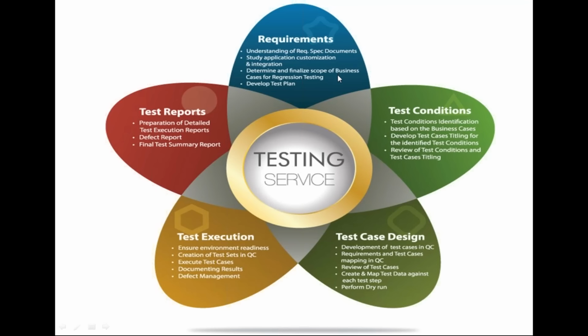and based on the requirements, how do you create your test plan? Okay, so the test plan again is most important from the testing perspective, where you will be telling these are the areas that I will be testing, this is the effort I would be requiring, and these are the resources who will be working on these areas of software development. Okay, and once that is done, you will have to develop your test conditions where you will have to identify the business scenarios, the technical scenarios which will be impacting the product that is being developed.